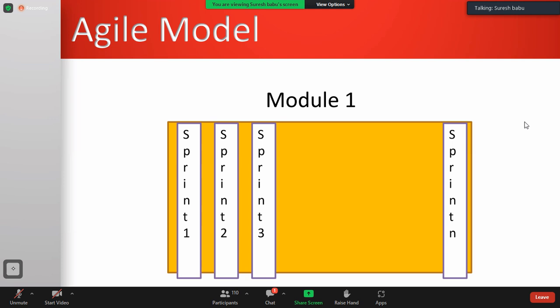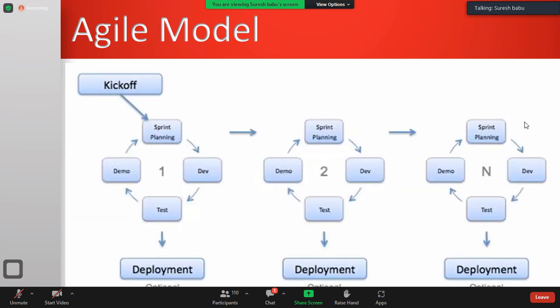Now in the first module we are planning, there are 10 requirements to be implemented. Do not plan to implement all 10 requirements in one shot. Plan to implement only 2 requirements in the first week of schedule. These 2 requirements together are called a sprint. 1 or 2 major business requirements planned for a short one-week or 10-day schedule can be called a sprint. Then sprint by sprint, the software gets implemented.